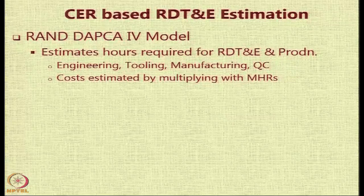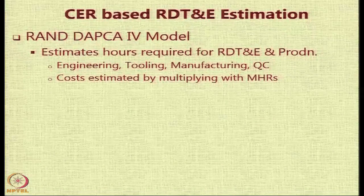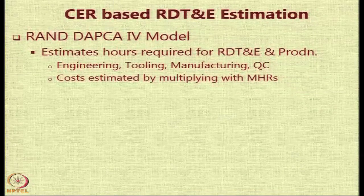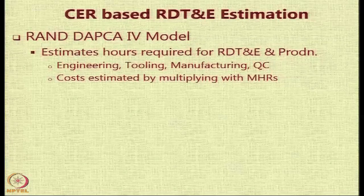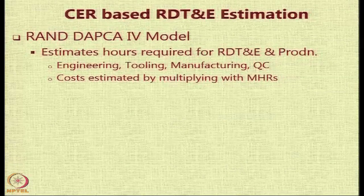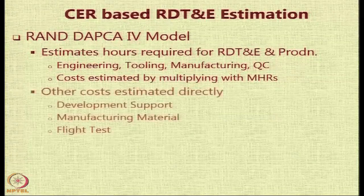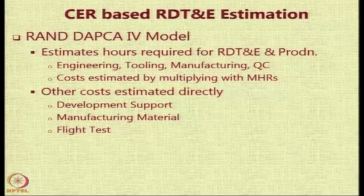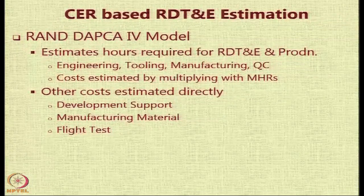We assume that some number of prototypes are going to be fabricated, giving rise to requirements for tooling and manufacturing. Based on important parameters which affect the hours needed, you estimate these hours and then multiply by the man-hour rates. Other costs which are not easy to estimate have to be added by estimating directly.